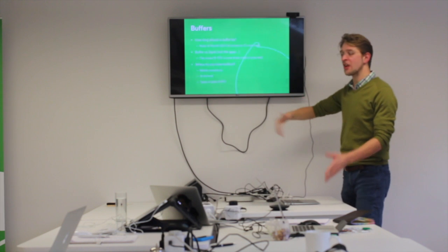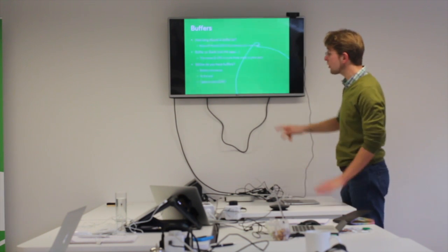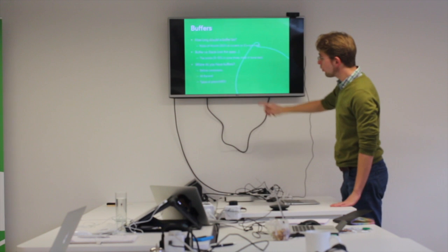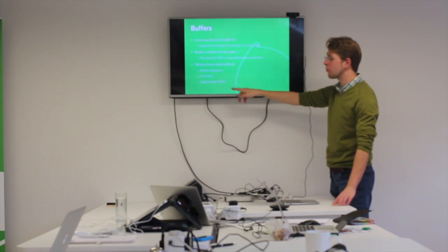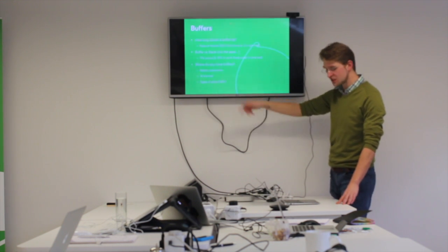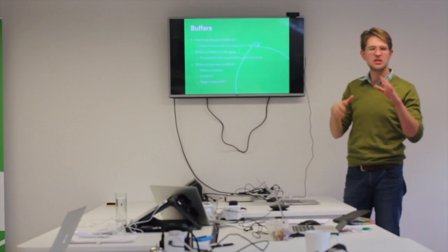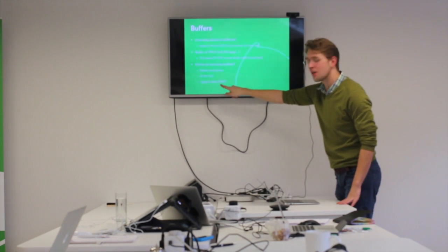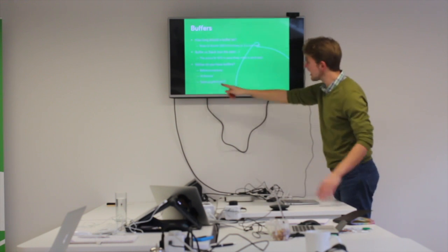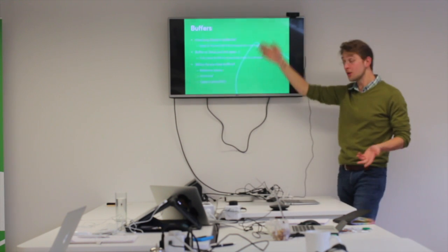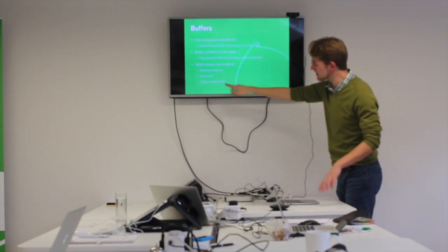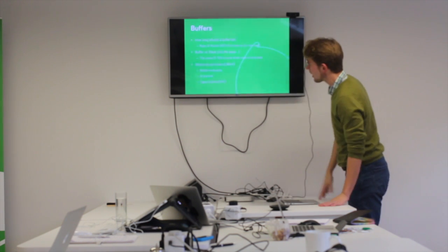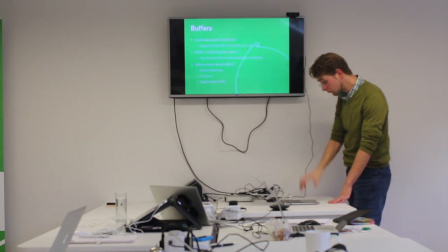And you put buffers everywhere you have a bottleneck, but you also put one buffer at the end of the process, and you also want to have buffers at the point at which you have a convergence. So there are different types of plant. There are diverging workflows, which are V plants, converging workflows, which are A plants, straight workflows, which are I, and then T, but T is really just an I and then an I and then a V.